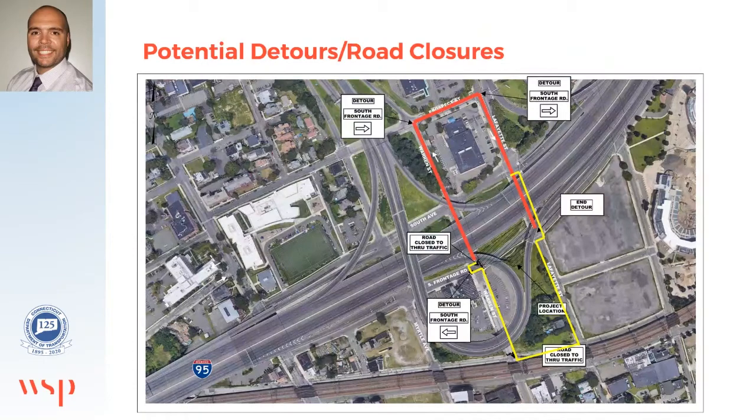It's a short detour, only about 0.4 of a mile, but we do realize this could impact those other streets and additional measures may be required. Besides roadway capacity and length, this route was chosen because it has adequate clearance for trucks. One detour alternative was to use Railroad Ave. However, due to low clearance issues, 2 detour routes would have been needed, one for cars and one for trucks, which would have been less desirable.